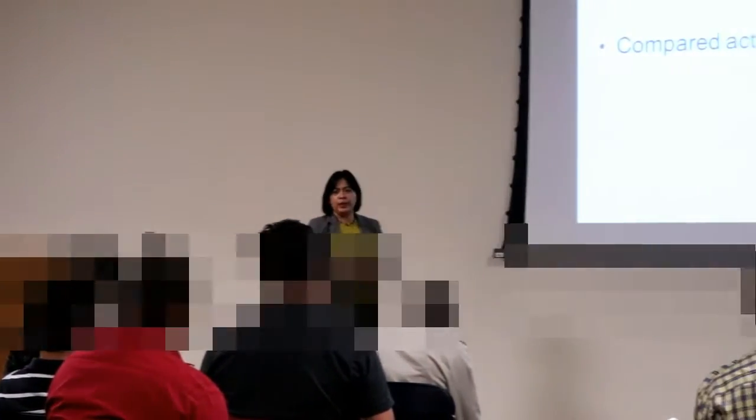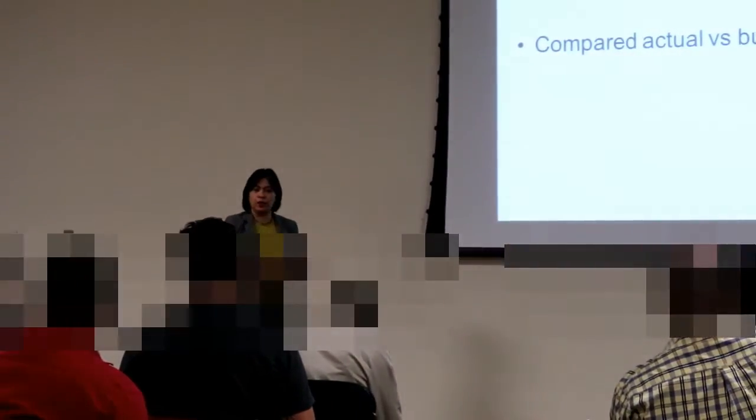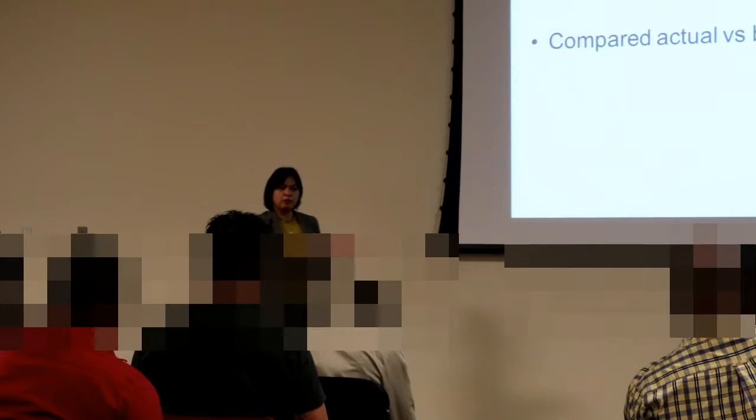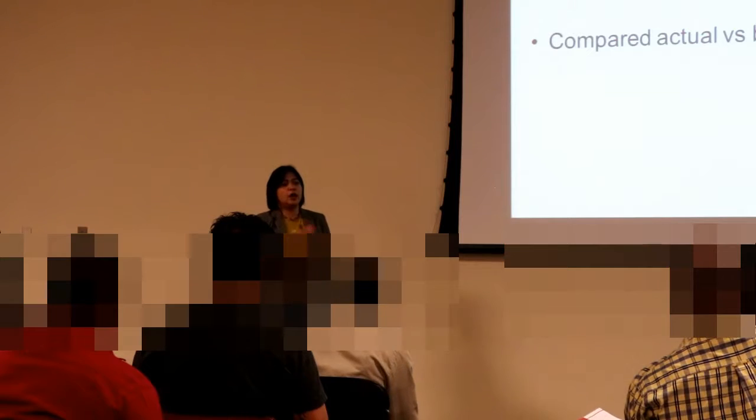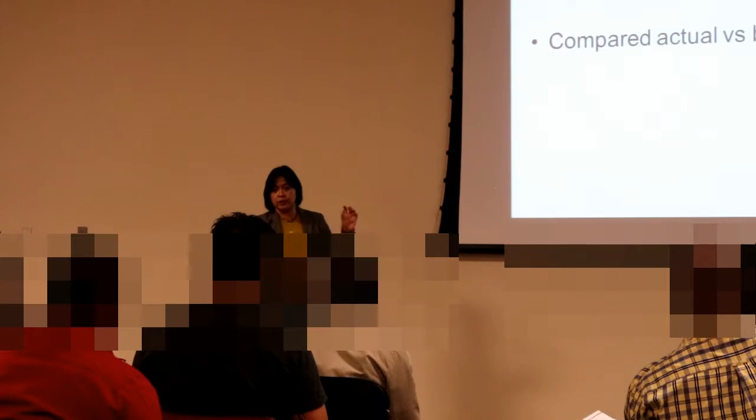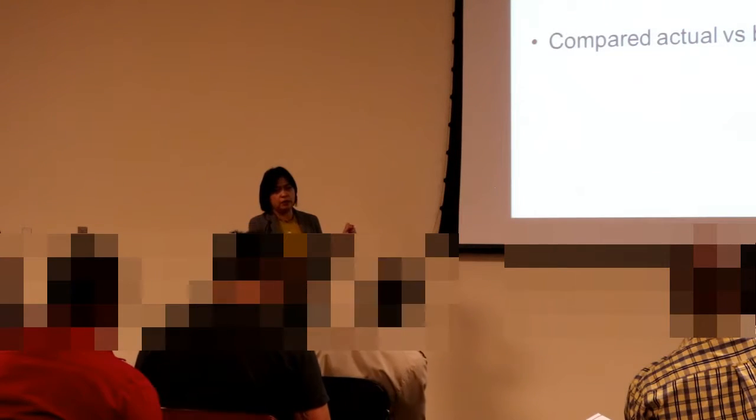And again, very important, I'm really not just talking about current management reporting, but more of planning as well for future profitability. If you have this information, the cost record of how much you spend on a particular project, and you have a similar project in the future, you know how much the cost is, so you know how much markup, and then how much will be your bid price based on that historical information, right?